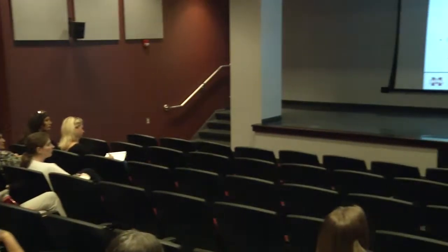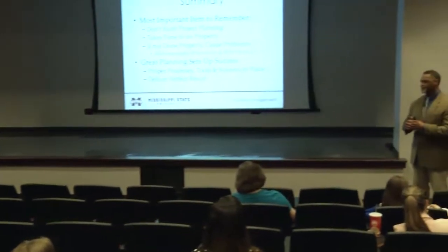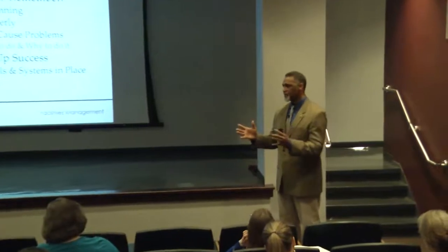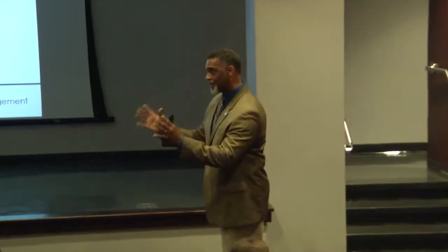Absolutely. What we try to do is once we amass the stakeholders of a particular group that make up the planning committee, I'll send out an email just to meet and greet. Hey, I'm this guy. We're calling to check with you. And then the second thing I typically do is try to call a coordination meeting. That's when you get all the parties together and you map out the strategy for what you're trying to do.